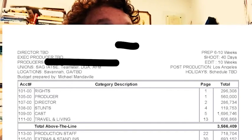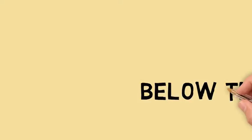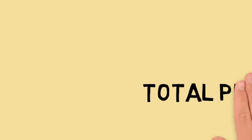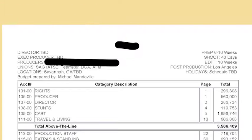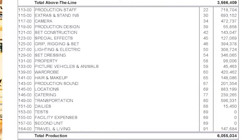Next we go to the total production, which is below the line — everything else other than above the line. Above the line is generally regarded as the talent; below the line is everything else. In the below the line category, total production is everything on the set to actually make the film: transportation, wardrobe, lighting, set construction, camera, etc. It also includes extras, stand-ins, and background performers, which are not above the line.